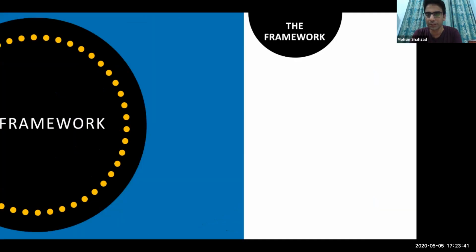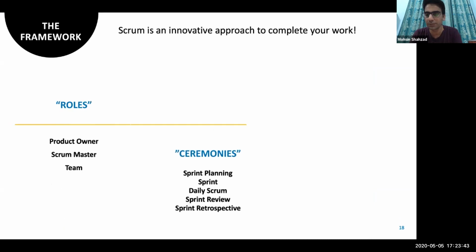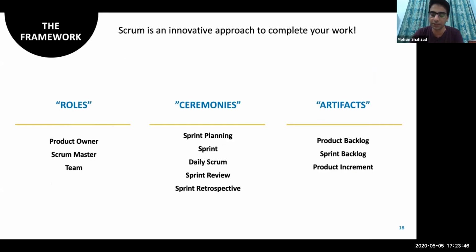And the framework is, again, as mentioned, pretty simple. In our companies, we have many designations. There's some project manager, there is some guy who's the team lead, there is some designer, there is some development guy or architect guy. So in Scrum, they summed up everything in only three roles. There's product owner, there's Scrum master, and a team. That's it. There's no manager. There is no subordinate, and no coordinator, designer, or architect. So only these 3 roles.